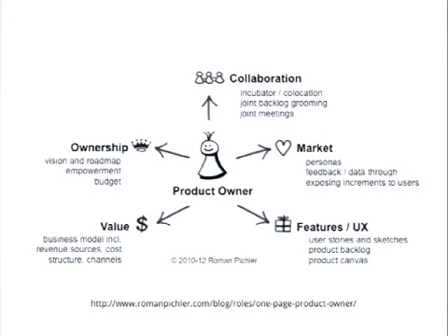At the same time, a project that seemed like it was planned out to the detail, and then the product owner just really didn't care. And in the end, the client didn't get what they wanted. So we do daily scrums. We send out weekly reports. We have approval deadlines. We have expected response times, all up front.